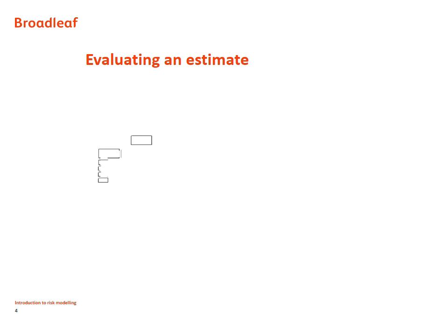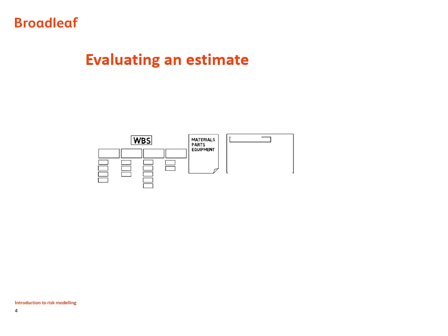If we remind ourselves how an estimate is evaluated, it might vary in detail, but in broad terms, we will have a work breakdown structure describing what has to be done, a list of materials and equipment to be purchased, and a schedule, even if it's just a list of key dates on a bar chart.